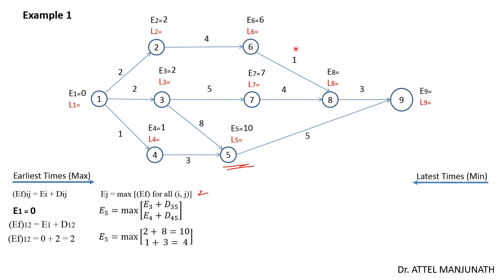For node 8, activities 6-to-8 and 7-to-8 merge: 6 plus 1 is 7, and 7 plus 4 is 11. Maximum is 11, so write 11 for event 8. For node 9, activities 8-to-9 and 5-to-9 merge: 5-to-9 gives 10 plus 5 equals 15, and 8-to-9 gives 11 plus 3 equals 14. Maximum is 15 — write 15 for event 9. Forward pass is now complete.